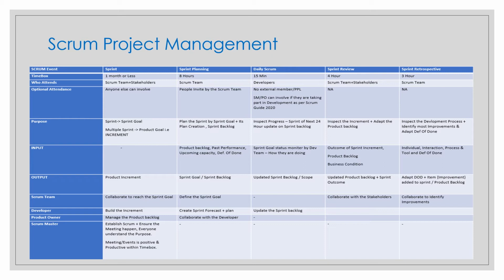When the developers select the product backlog items they think can be completed in the sprint, they create a forecast of what will be delivered, like a weather forecast. The sprint forecast is not a guarantee, a promise, or a commitment, but definitely something you can do in a particular sprint. The sprint backlog is a temporary artifact that exists only during the sprint, and they achieve it with their level best.